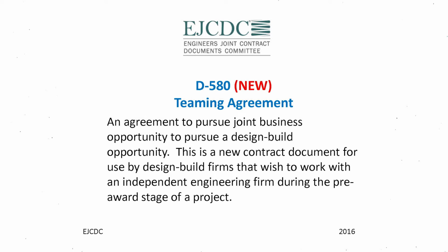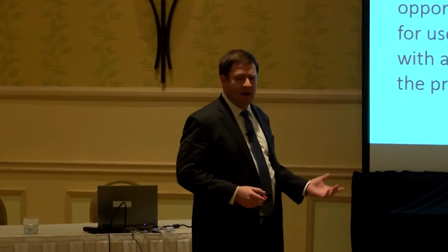This document is tailored specifically for a design builder bringing on an engineer. But it can easily be modified for a design builder to bring on other parties that it might need during the proposal teaming agreement, such as subcontractors. One of the big parts of teaming agreements is, you want to bring people on to your team and have them exclusively committed to you throughout the project, and also be able to establish some of the confidentiality and non-disclosure elements of documents that might be exposed during this pre-award phase.